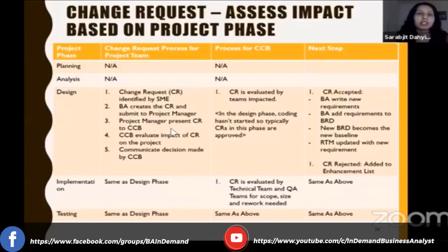So if it doesn't impact the business, if the business doesn't see it, right? Like if it's a change on the back end. Typically there's things that are customer facing and then there's things that are on the back end, right? So if it's not impacting the customer in any way, you don't go back to the subject matter expert. You log it as a defect, you work with your developers, you update the technical specs to identify the changes being done, right?